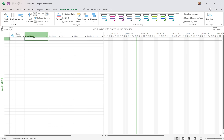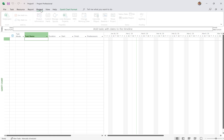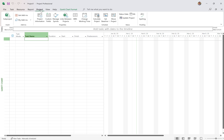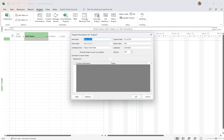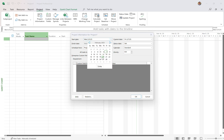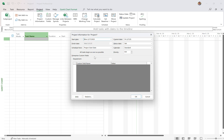First thing you want to do is come into Microsoft Project and click on the Project Ribbon — this is how you set up your project. Click Project Information. This is where we can set the start date for the project. Let's say I'm going to start it on the 17th of this year. That will be the date that all of the tasks in your project will be scheduled from.